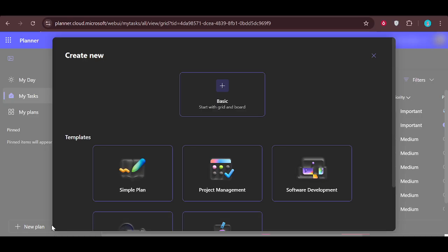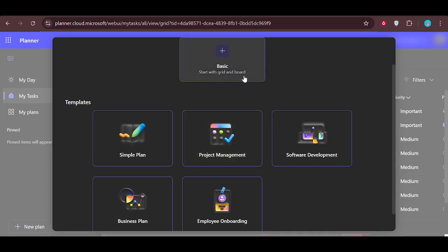Instead of immediately creating a blank project, you should see an option that mentions importing. You're looking specifically for Import from Project Desktop. This is the feature that lets you take an existing Microsoft Project MPP file, which is normally used in the desktop version, and bring it into the online environment so you can view and manage it in your browser. Click Import from Project Desktop.